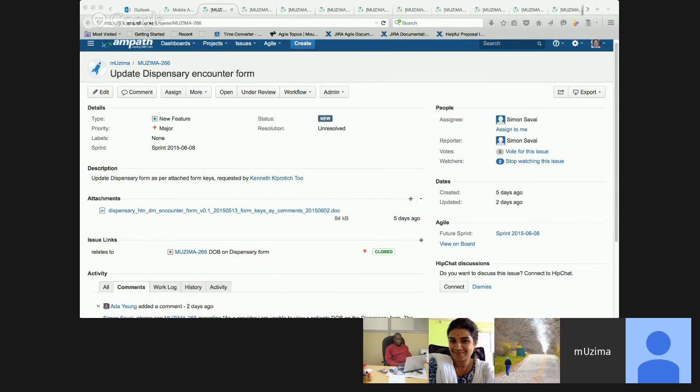The original specs did not even include this long list of comments and suggestions, like adding these 12 validations. If at the beginning they only provided 5 validations, I think we should lock it, and any additional comments should require a new ticket. I just don't want the same ticket for the same form to be in 5 sprints because of that.